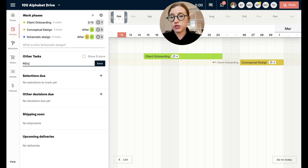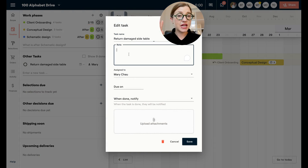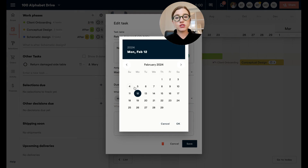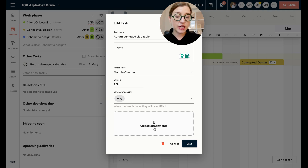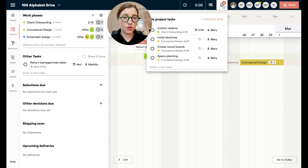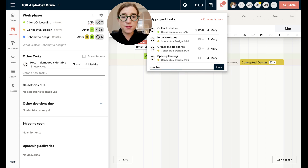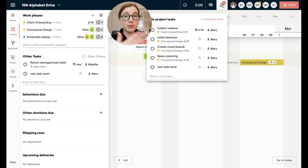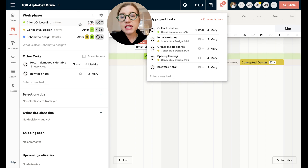What you won't put in plan tasks are one-off tasks — things like returning a specific item or doing one thing for one client. These are totally random and not something you can plan ahead. You can come in here and just type in other tasks, like returning the damaged side table, hit enter, and then click on that task to add notes, assign it to someone, have Materio notify you when it's done, set a due date, and add attachments like a return label or receipt. You can also see tasks in this project's task widget.